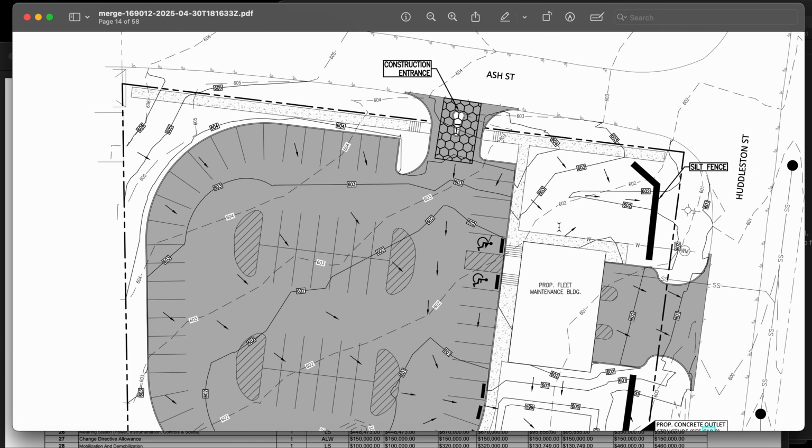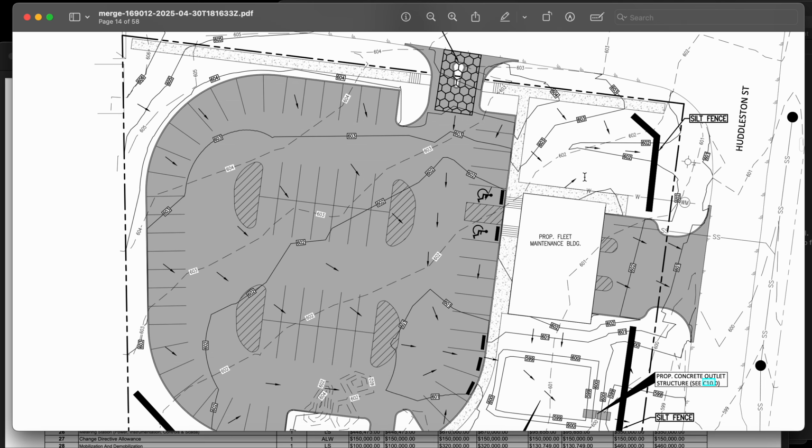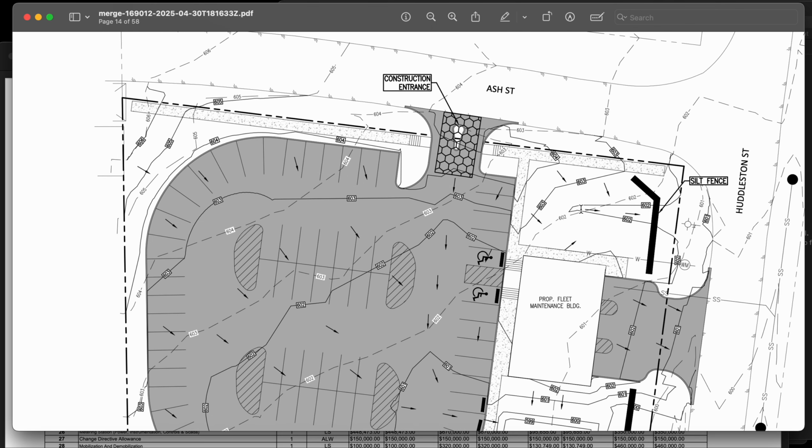These concrete washout pits we build with probably $50 worth of plastics, 2 loads max of concrete export, and our price is roughly $2,500 to $3,000 for that. So that's our washout pit, our construction entrance, 2 loads of regular dirt. We also like to say that we include the import and also the export to justify our price.